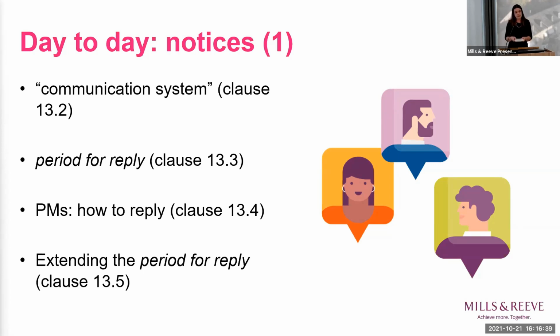In terms of extending the period for reply, Stuart mentioned at the beginning that often there's quite a lot to get done in the period for reply. It can be extended under clause 13.5. Either party can ask. One party should write to the other and request a reply, and they should make sure that they get a response to that reply before the end of the existing period for reply.